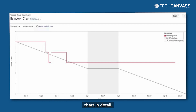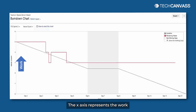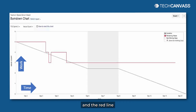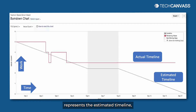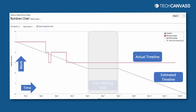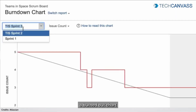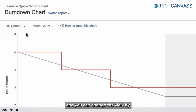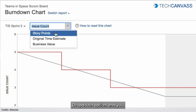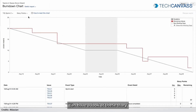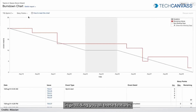Now let's look at the burn down chart in detail. The x-axis represents the work and the y-axis represents the time. The red line represents the actual timeline. The gray line represents the estimated timeline. And the gray box in the center represents the non-working days. You can create a burn down chart for other sprints as well, and you can change the view by clicking on the issue count drop-down option. You can also view the story points burn down chart. The burn down chart is really flexible in providing all these features, and you can change the view as per your convenience.